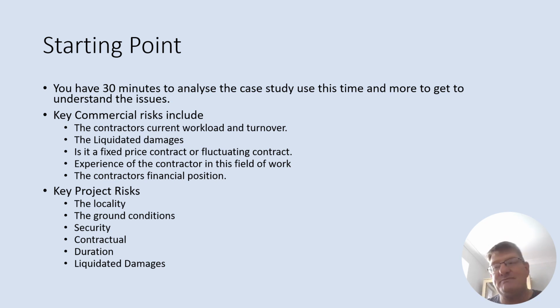Experience of the contractor in this particular field of work. Is it new? Are they going into a new field of work, or have they already got experience? If they've got experience, you're fine. Well, you're not fine, but it lessens the risk. It's one of the ways that risk can be mitigated or minimized. Obviously, if you're new, if you're a house builder and suddenly you decide to go into building factories, it's new for you. So it's a higher risk. It's a higher risk endeavor. All right.